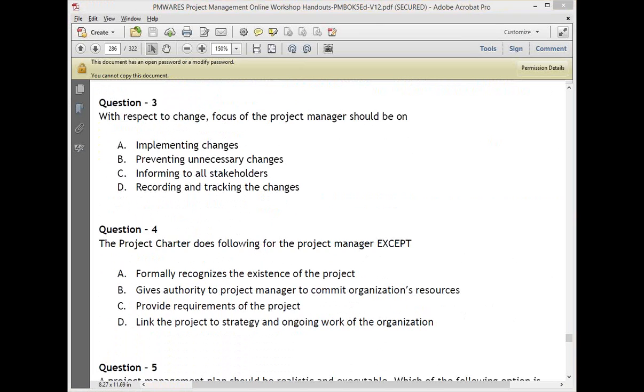B is an intelligence that you are applying, to see if this is really required or not. So the first step is qualification. So the first step is actually B. If it qualifies, then we will go ahead. Otherwise, we'll just reject it with the argument that it is not in line with the project objective or project business case.